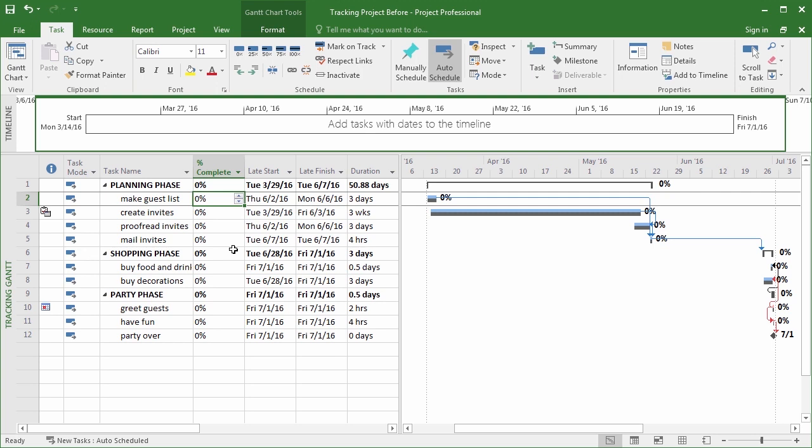Generally, the resource will give you some sort of estimation. Now, some places do work out actual physical scales, called a physical percent complete scale, where you can look at the task and physically measure how finished it is. If that's where you work, then great. Otherwise, most of the time you end up with kind of a guess. Maybe I'll put in 50%.